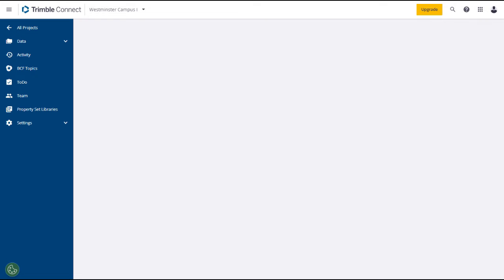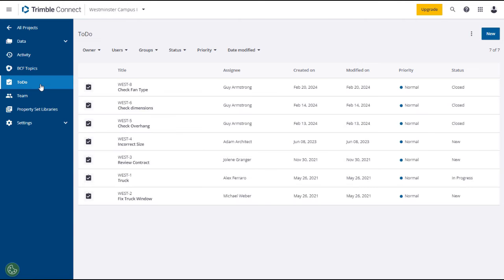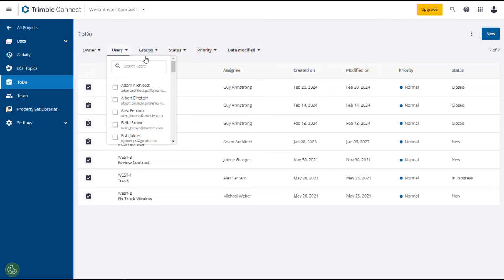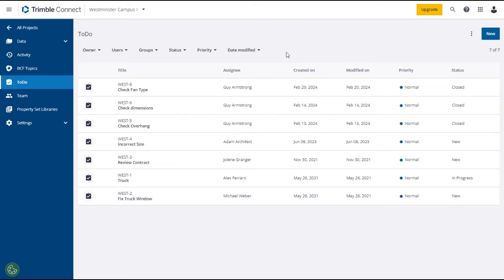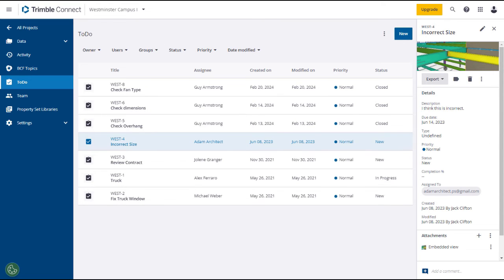To-dos are a helpful tool to assign, track, and resolve issues within a model. To-dos can be assigned to a user or a group with a due date for when the to-do needs to be resolved. Authoring tools such as Tekla Structures and Revit can export BCFs for issue and task management, which can then be imported to Trimble Connect as a to-do. The to-do can then be assigned and prioritized. To access to-dos, click on the To-dos tab in the left panel, which will load all of the to-dos on your project in the main panel, defaulting to the most recent first. You can sort and filter your to-dos using any of the attribute drop-downs. Click on a to-do and its information will open in the right panel. You can add a comment or export the to-do in BCF or Excel format.